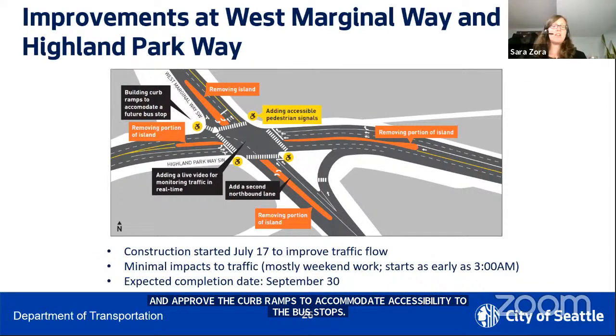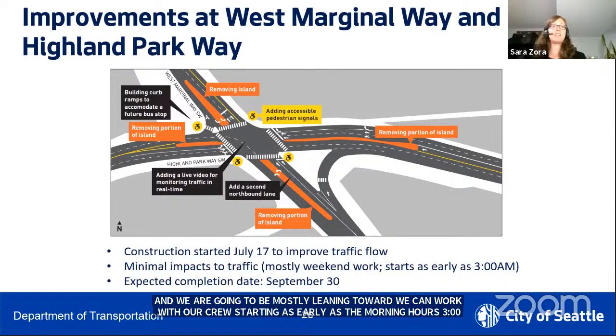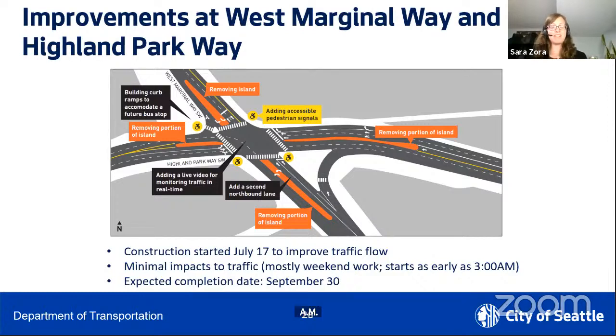We will be doing this construction now as we have just started, and we're going to be mostly leaning towards weekend work with our crews starting as early as 3 a.m., so that we can try to be out of there when traffic starts picking up again. We will have maintained travel lanes during that construction. We expect to complete that construction by the end of the next quarter, Q3, September 30th.